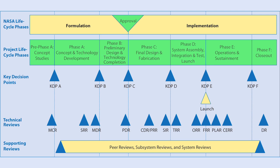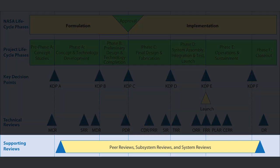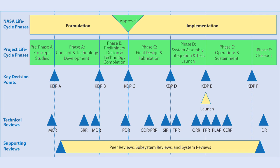The primary technical review in Phase C is the Critical Design Review, and there's also a System Integration Review. The Critical Design Review — similar to the Preliminary Design Review in Phase B — will be preceded by a series of lower-level component and subsystem reviews looking at design maturity in Phase C. That series of peer reviews and subsystem reviews will all lead up to a major system review called the System Critical Design Review.